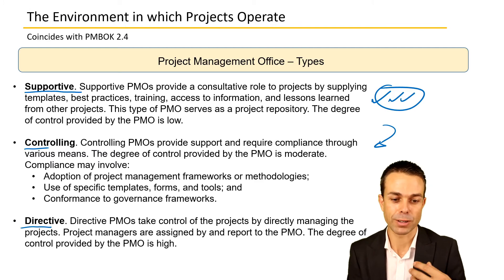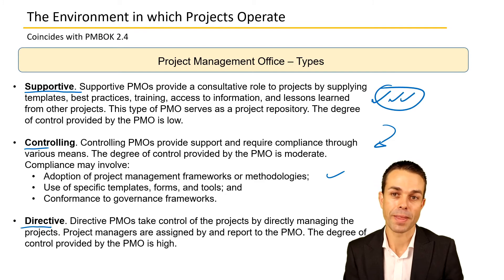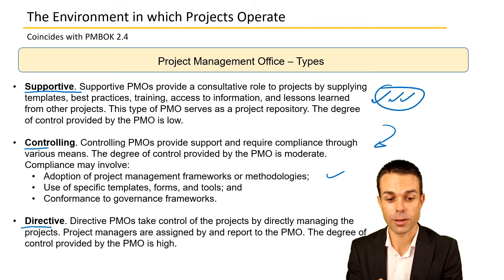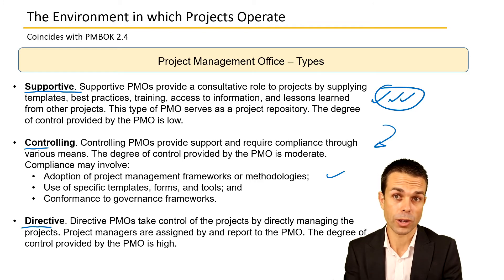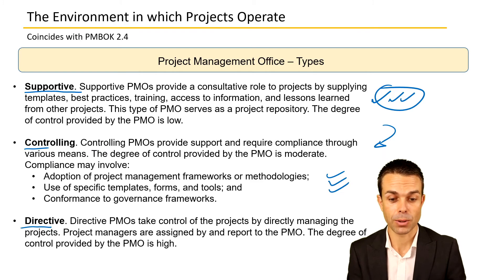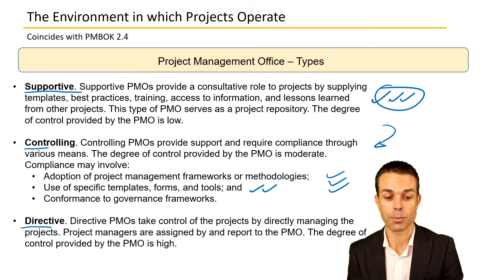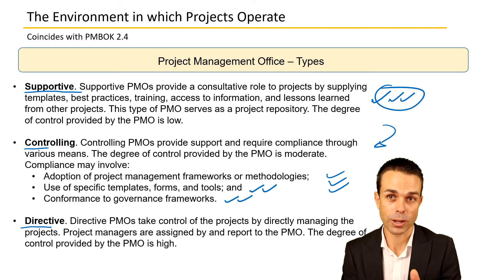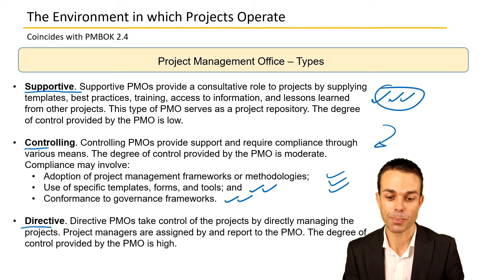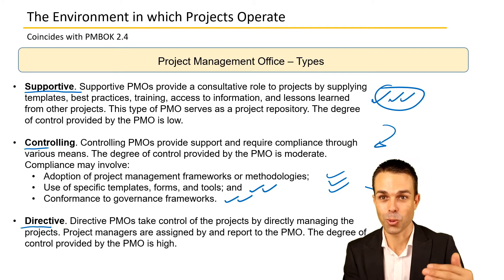Controlling PMOs provide a specific project management framework or methodology, and use of specific templates, forms, and tools — but they ensure that you do use them. It's controlling the project through conformance to governance frameworks, specific methodologies, and specific ways of working.